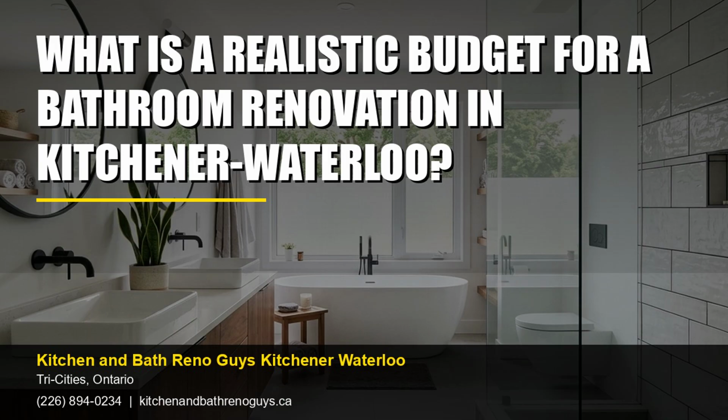Permit costs in Kitchener-Waterloo can vary, but they usually range from $200 to $500. Skipping permits can lead to issues down the road, including fines or complications if you decide to sell your home. To manage your budget effectively, consider these practical tips.